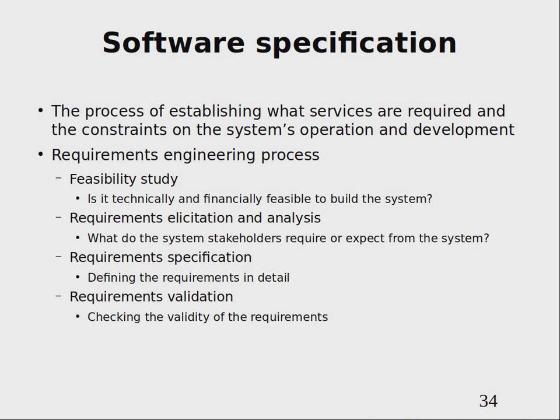But before that, you need to do this feasibility study, which means you need to consider, can you afford it or not? Because in general, any system which is more powerful and rich in features also will be harder to develop, harder to test, implement and maintain. So if you can't afford it, maybe your intentions should be to use and implement something different.